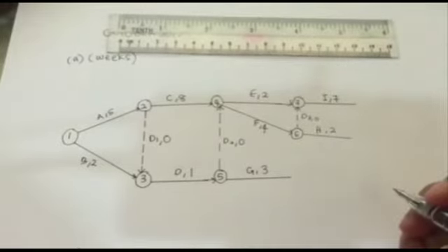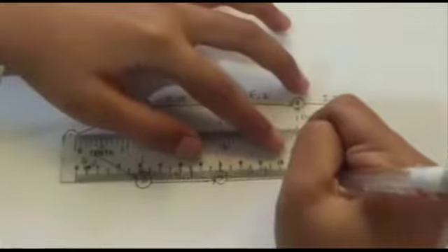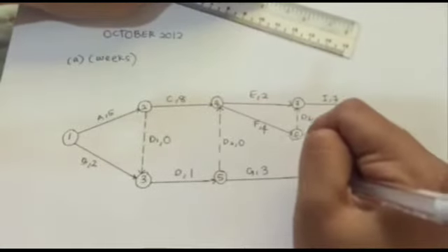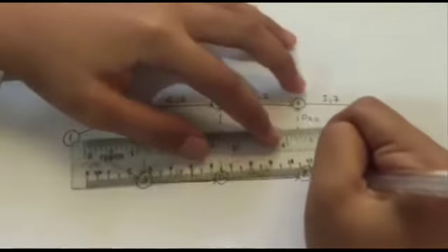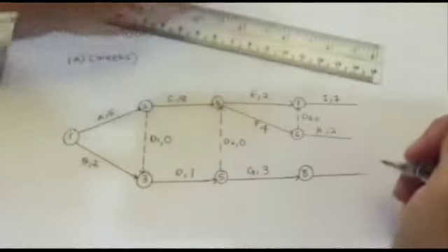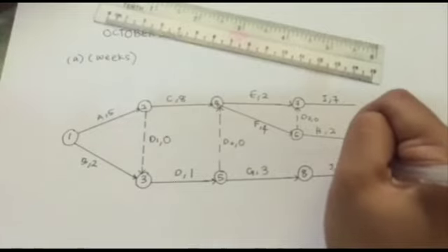Okay, next activity J, the preceding activity is G, so G is the predecessor. So what you have to do is put number 8 in the circle and bring out J, the duration is 6.